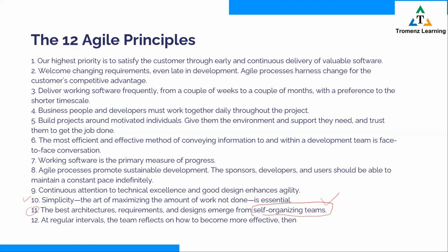Now ask the same questions in Agile. Please note, the answers have changed. When it is Agile, the answer to these questions is that the team is going to do that. Who is going to do the detailed planning? Not the PM, it's the team. Who would assign work to the team? Nobody does. The team would assign the work to themselves. Who would set a target for the team? Again, nobody. The team would pick up their own target. That's what a self-organizing, self-managing team is. This aspect is way different from a predictive life cycle.